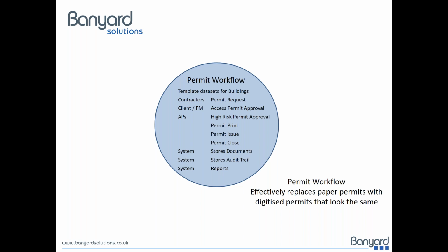Contractors can go through a process of raising a permit request. It could be contractors, but it could be your own team that actually raises permit requests on behalf of contractors. That's entirely up to you and how you currently go through your process. But a lot of people are trying to push back the responsibility of requesting permits back onto the contractors because they know who they're going to send on the job, and they also know the time frames that they'd be looking to do the work, so it fits into their schedules. So contractors can raise permit requests within the system.